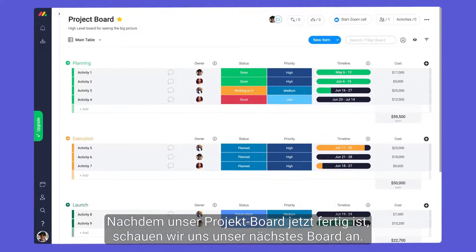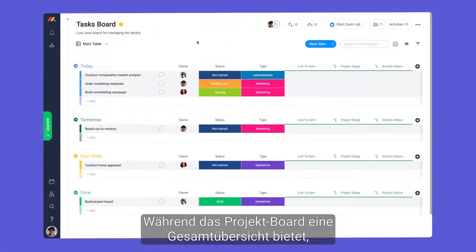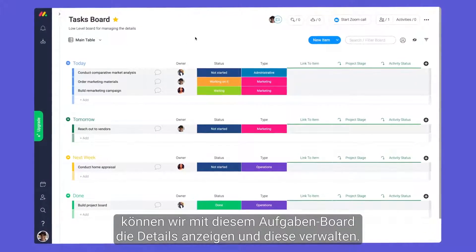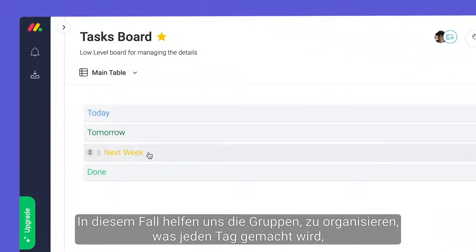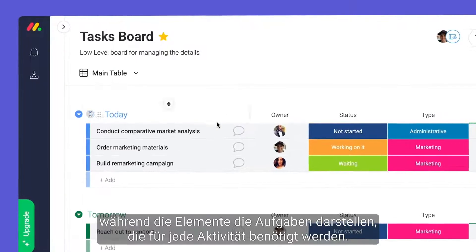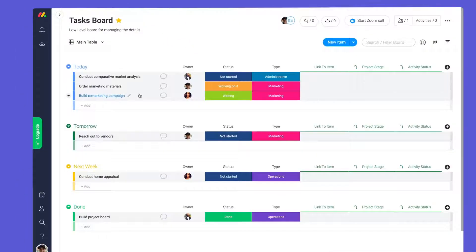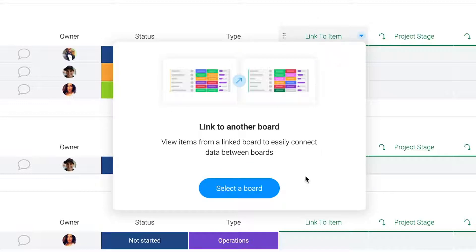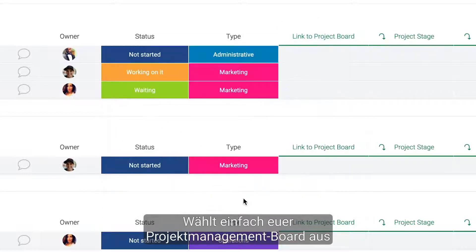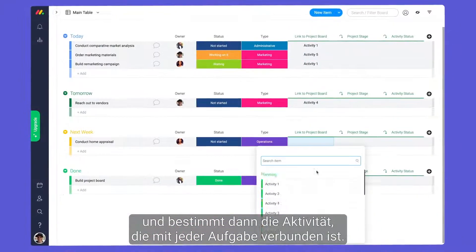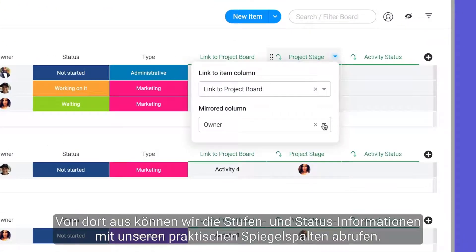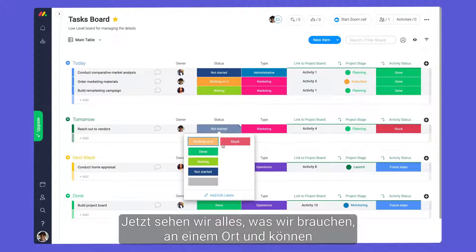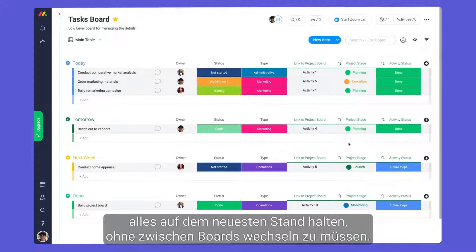With our project board set, let's take a look at our next board. While the project board provides a high-level overview, this task board allows us to zoom in and manage the details. Groups help us organize what will be done each day, while items represent the tasks needed for each activity. Here we can tie our boards together with the link to item column — simply select your project management board, then designate the activity associated with each task. From there, let's pull in stage and status info with our handy mirror columns. Now we'll see everything we need in one place and can keep things up to date without switching boards.